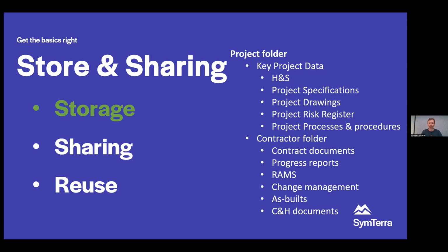One project I worked on years ago mandated 1,400 folders for the project itself, and it only contained about 5,000 documents. It was impossible to find anything. It was time consuming. And if you don't have fancy IMS, information management systems, in place, Dropbox or OneDrive work fine to keep the basics.